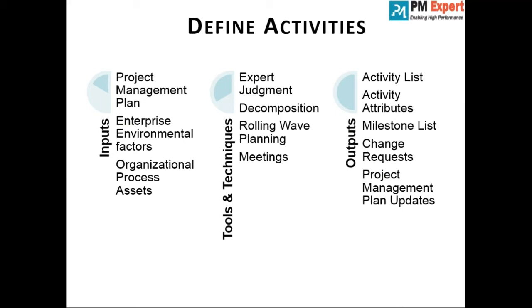So what I'm trying to say is, the higher the risk and the higher the complexity of scope, the shorter the planning horizon should be, because continuously you may have to adapt based on the conditions. Higher the uncertainty, shorter the time horizon.